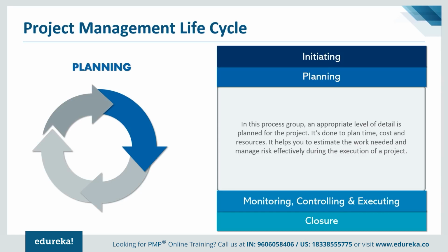Question number 1, what needs to be communicated? Question 2, how does this need to be communicated? Question 3, who will communicate this? 4th, at what frequency will you communicate? 5th, what format will you communicate in? 6th, who should be receiving this communication? See, when I start asking all these questions, these are what are supposed to be discussed in each of the planning processes here. So the questions I asked are the questions we generally ask during plan communication management.